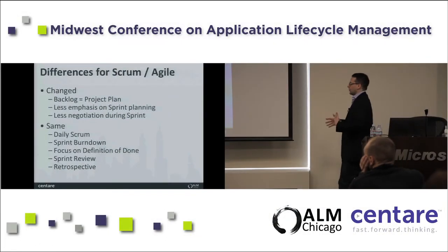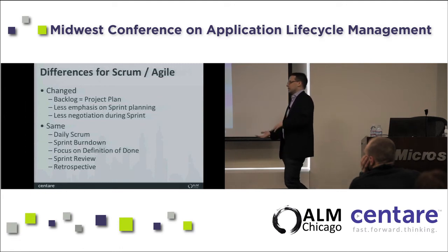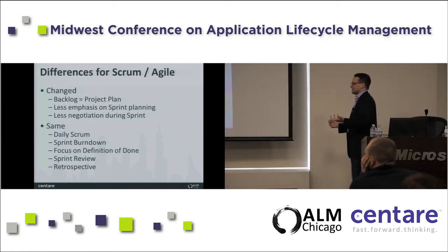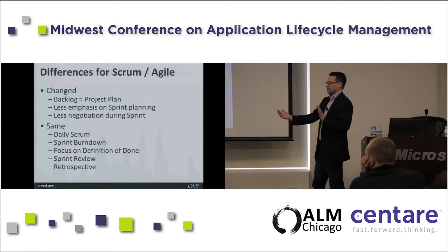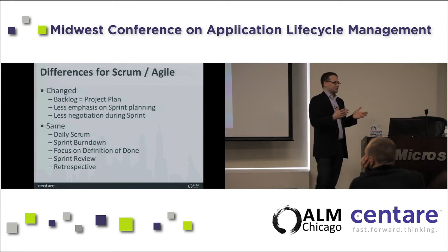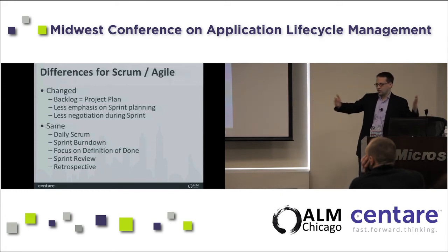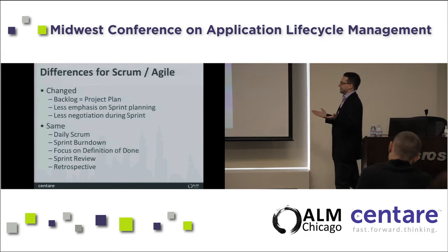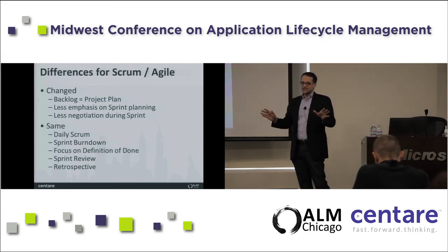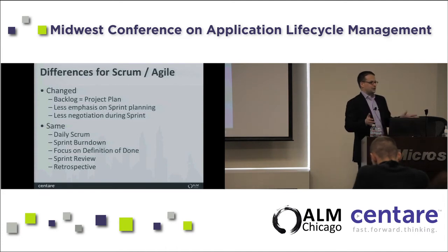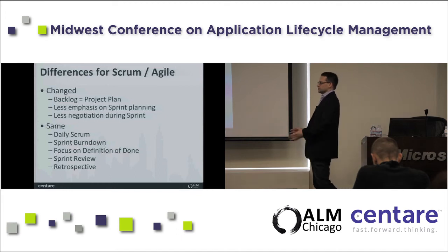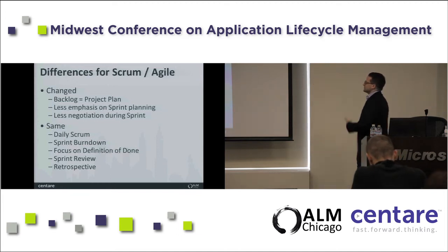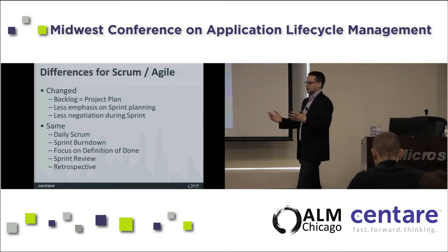So thinking about what the differences are going to be for your Scrum teams is, well, you're going to lean a little bit less on the backlog. Your backlog is going to look a lot more like that project plan, and you're going to do less prioritization because the prioritization is the order of stuff in the Microsoft project plan. Now, keep in mind, I'm still saying that this is a grumpy marriage. This is just kind of the way that you can make it work. I'm not saying it's necessarily a good idea, and the Scrum people would probably be yelling at me right now that it's totally wrong. This is how you make grandma and grandpa actually like each other.